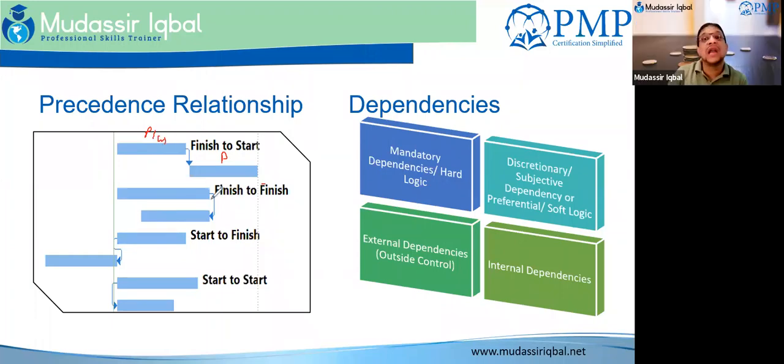Which means we would like the wiring and the plastering to finish at the same time, so that the next activity we could start is painting. We don't need to worry, because plastering may be done by somebody else and wiring by the electrical team.